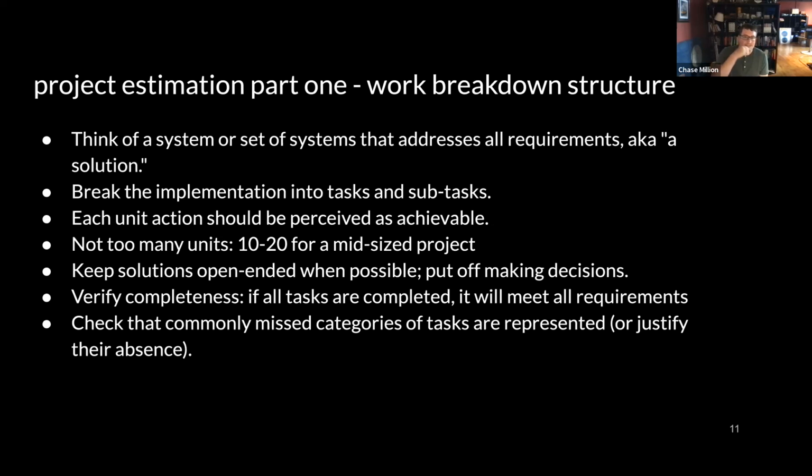In any project, again, at the scale we're talking about, I would suggest maybe 10 to 20 of these. If it's a big research project, maybe 40. If you have too many, if you've gone too fine in resolution, maybe your project is too hard, or you've just decomposed too much, but you should resist that urge as well.